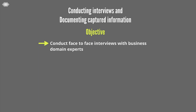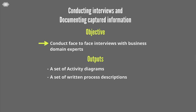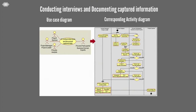There are at least four outputs that should be developed in these steps: a set of activity diagrams, a set of written process descriptions, an integrated activity diagram that represents an interconnected view of all involved business processes, and a time procedure chart. With support from the project manager, process analysts should meet and interview business domain experts who are knowledgeable about the target business processes, and if possible observe actual practices in the real environment to verify and validate their findings.